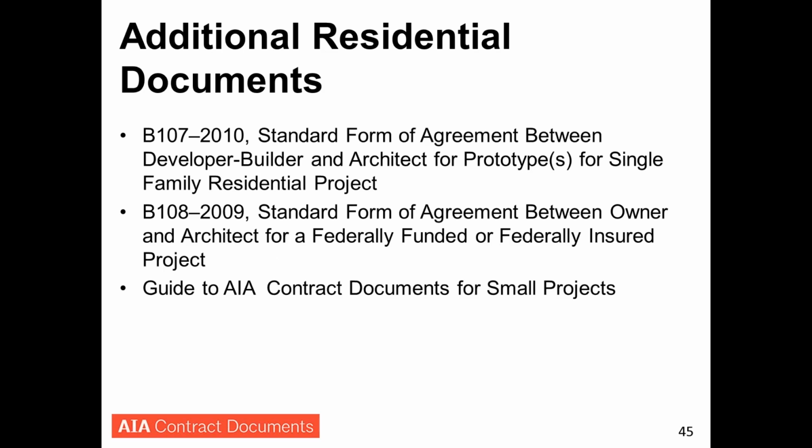Yeah, I would just mention on that, on the jurisdictional requirements, some jurisdictions even have specific forms in residential construction because they view it as a consumer protection area as well. Some of them have specific forms providing different types of notice that have to be given to homeowners, and those have to be attached to your agreement. So you really want to make sure, as Kevin said, that you've done your homework and include everything that needs to be included in that type of project.